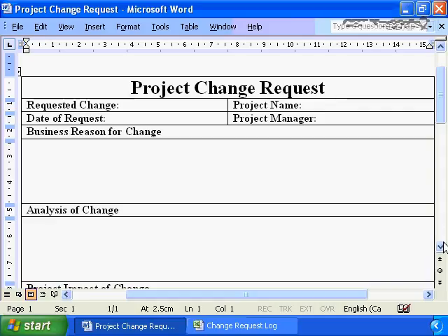If B is documented as a flaw in the requirements definition document and the business wants to change that, issue a change log that says on X date, you issued a change that says business reason for change, B is no longer a flaw, analysis of change, business impact of change, final signature. That is your approval. That is your justification. That is your audit trail that warrants, justifies, and validates whether or not B as a flaw is included in the final system. If it's on a document, if it's been signed off, if it's approved, that's what your project is obligated to deliver.